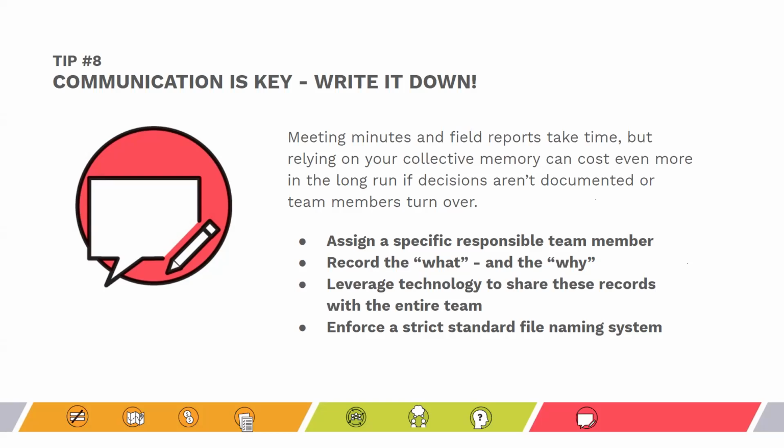So during my fellowship, I worked on a small commercial space renovation. Nothing fancy, just around 3,000 square feet. The project was somewhat complicated by the funding sources, but ended up taking 5 years to complete due to a host of reasons, mainly focusing on lack of recorded communication from the initial team that worked on the project. Between leadership transitions and staff changes, the project decisions and history were very hard to track.